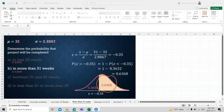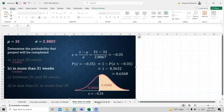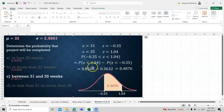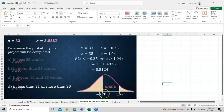For the probability of completing between 31 and 35 weeks, we have two x values giving z-scores of approximately −0.35 and 1.04. We take the difference of the two probabilities: 0.85 − 0.3632 = 0.48, so there is a 48% chance. For the probability of completing in less than 31 or more than 35 weeks, the result is approximately 0.51, or 51%.